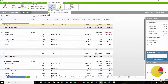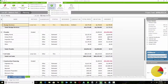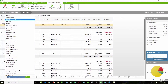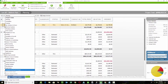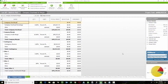For the general population of clients I've worked with, they'll typically start out with an idea of the margin they want to make on the job. In that case, we're definitely going to point them toward the company overhead and margin section at the end of the estimates. There are a few cases where line item markups are critical if you're trying to program profitability into different parts of the estimate. What we should probably do is take a look at planning from the beginning toward a certain profitability using the company overhead and margin section.